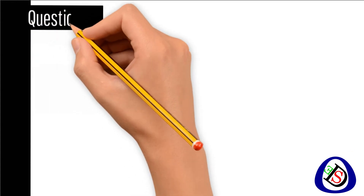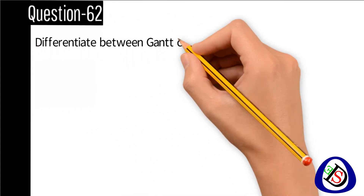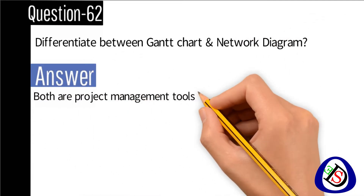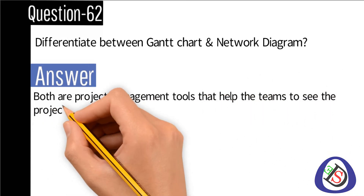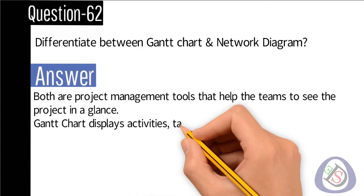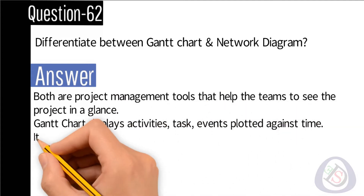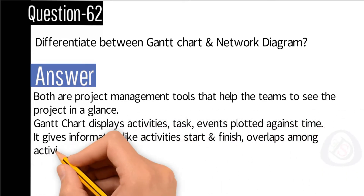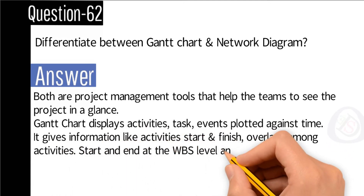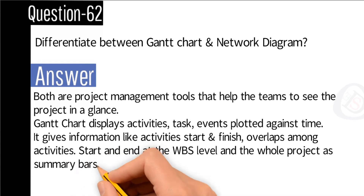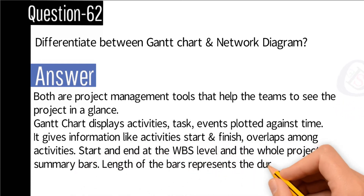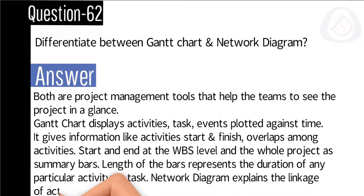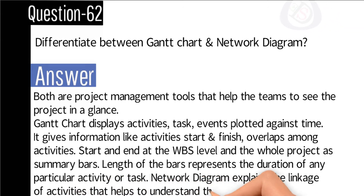Question number 62: Differentiate between a Gantt chart and a network diagram. Answer: Both are project management tools that help the team see the project at a glance. A Gantt chart displays activities, tasks, and events plotted against time, showing start and finish dates, overlaps, WBS-level summaries, and bar lengths representing durations. A network diagram explains the linkage of activities to help understand the flow of work.